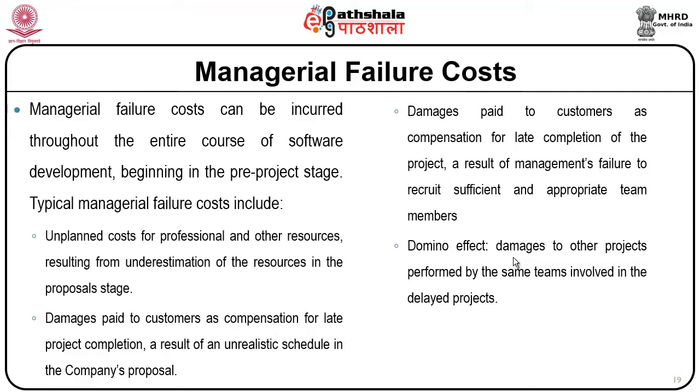Next, domino effect: damages to other projects performed by the same teams involved in delayed projects. A delay in a project which a team is working on will affect the project the team is supposed to work on immediately after completion of this project.